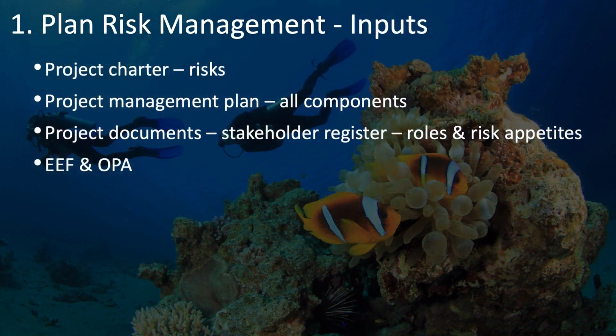As with virtually all of your planning processes, the project charter is at the top of the list of inputs to this plan risk management process. Not only is it a high-level document that is used in planning in all of these other knowledge areas, it specifically includes any high-level risks that have been identified that should now be included in your risk management planning.